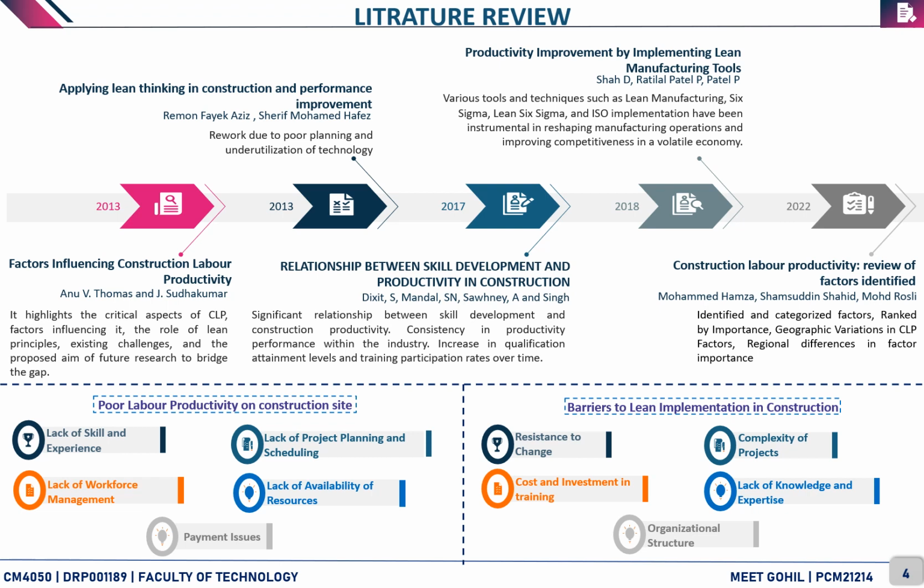The main challenges found in this paper were recruitment and retention challenges, payment delays and resource shortage, motivation, supervision and site conditions, rework, planning, communication issues, and technology utilization were the main issues.